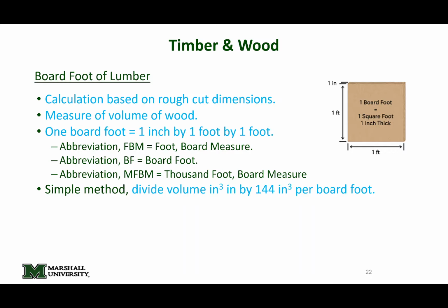And 2, round lengths. So if you had a length of 12 foot, 3 inches, just use 12 foot. That's it. There's not really a lot to say about computing a board foot for a given product. It's pretty simple. Does that make sense? Is everybody okay with that? Everybody good with their board foot computations?